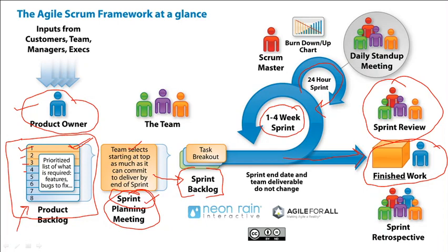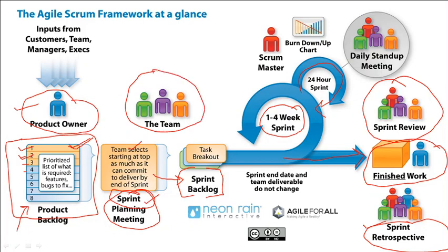After developing the first sprint or module, it will be showcased to the product owner — we will showcase our work against requirements. After that, we have a sprint retrospective meeting where we review problems from the first module and resolve them before the second module starts. After the sprint retrospective, the process starts again: we take the second user story, hold another sprint planning meeting, divide it into subtasks forming a new sprint backlog, and development starts again with the dev team.